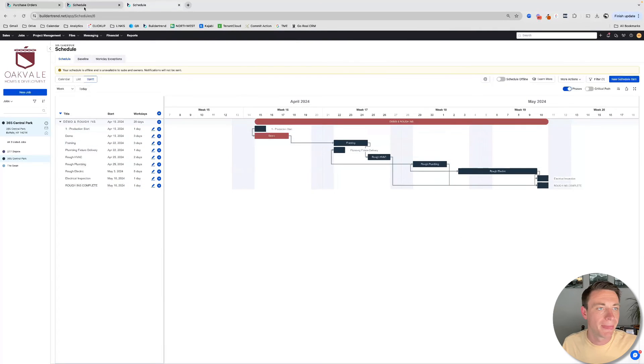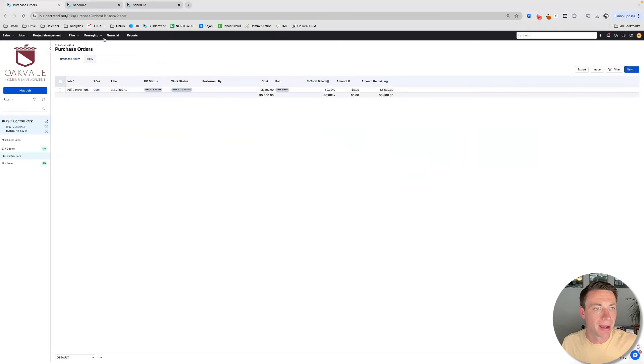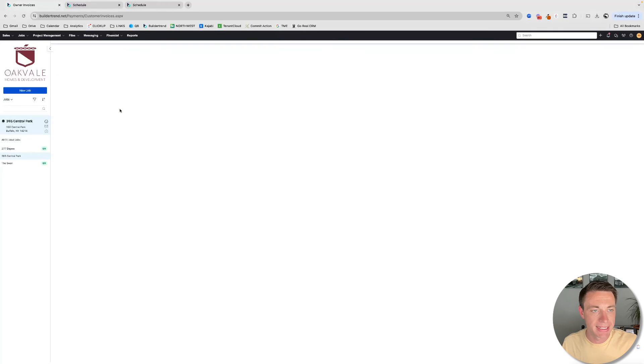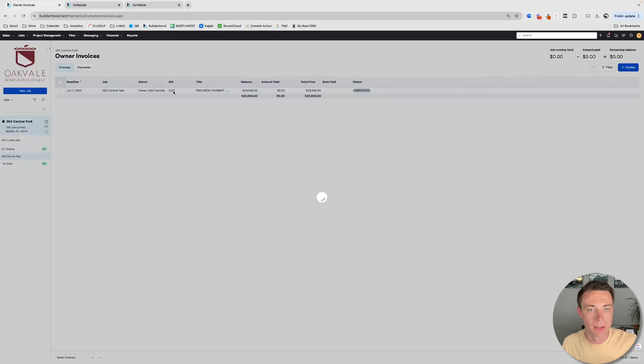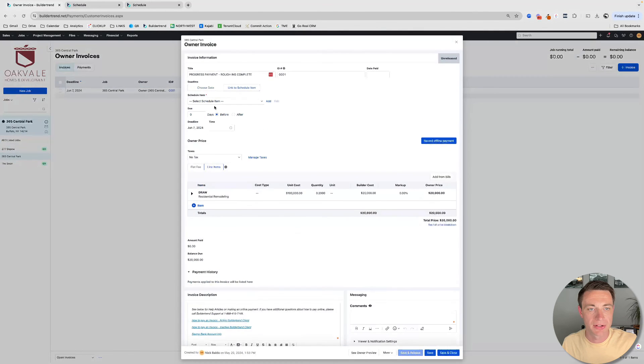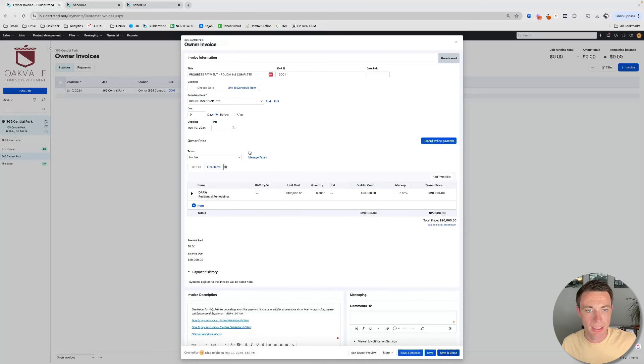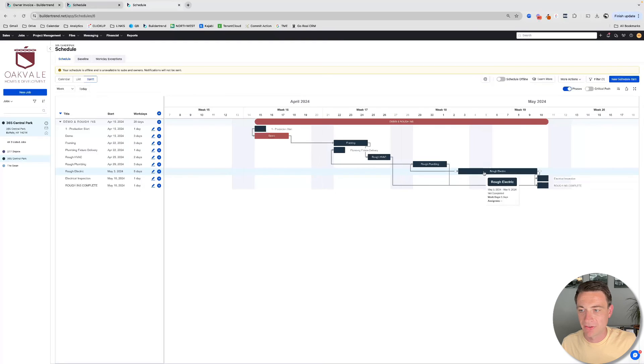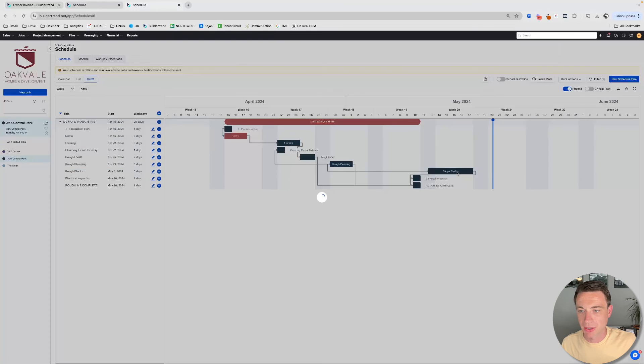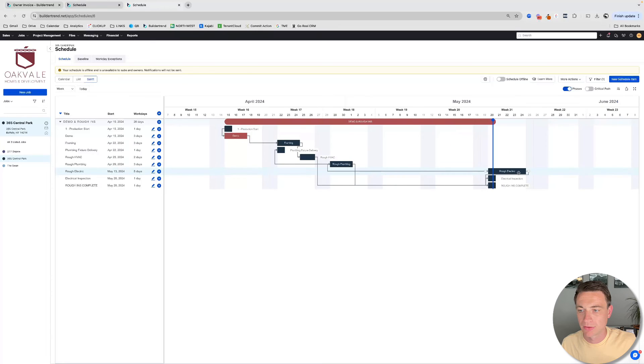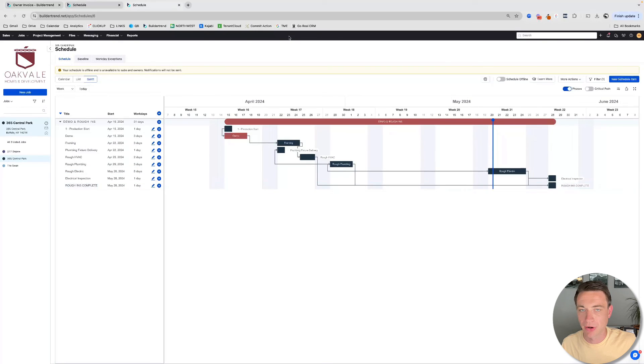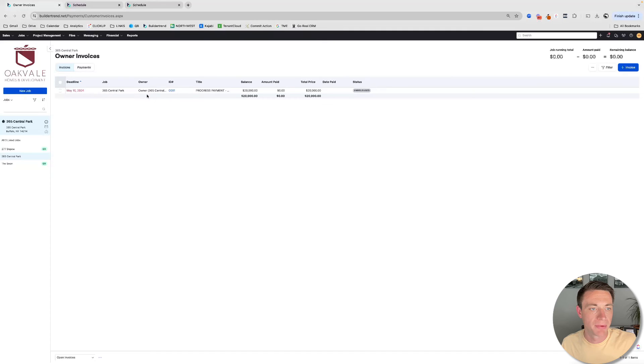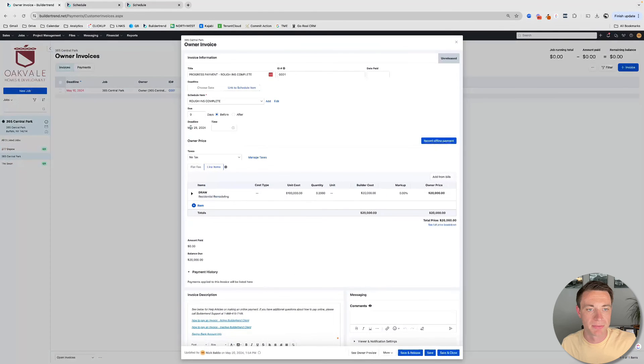So there's my rough-ins complete. And then I can go to my invoice and I can tie it to that single schedule item. Rough-ins complete. Excellent. And it's due exactly on the date. And then of course, as you can envision, if and when I move electrical out, that's going to move out all of my rough-ins. Let's move it out further. Move out all of my rough-ins. And then when I look at this invoice, now my due date has moved as well. Super powerful.